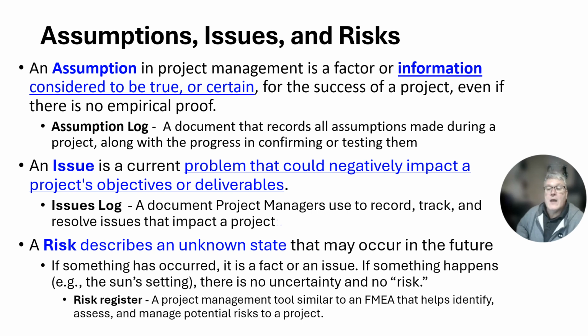Sometimes in project management, there's an assumption log, so everybody is on the same footing. That assumption log may include definitions regarding terminology, if it's specialized terminology. So an assumption log is a log that records all assumptions made during a project, along with the progress in confirming or testing them.